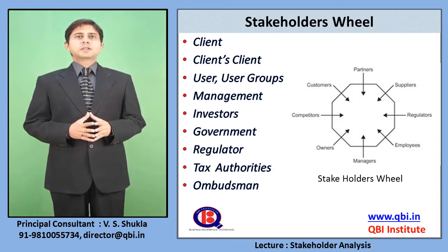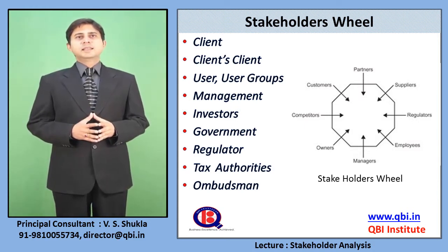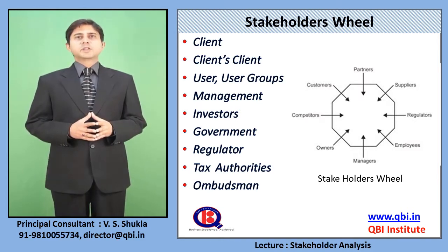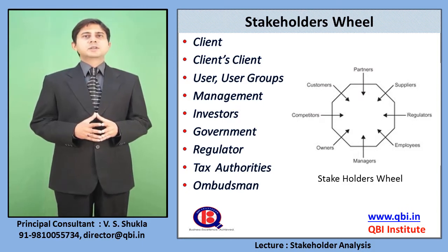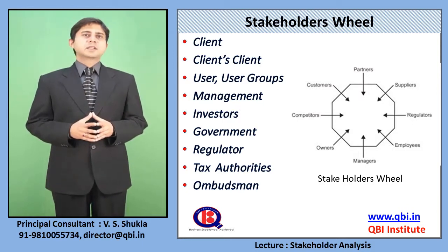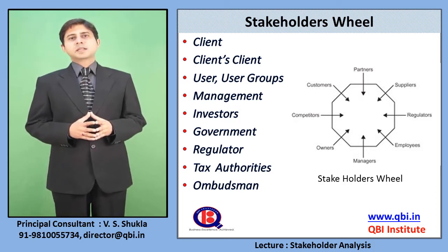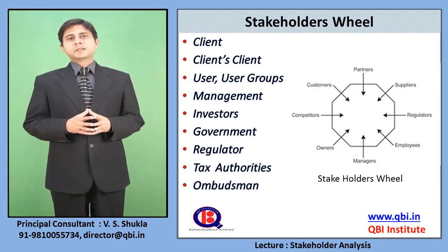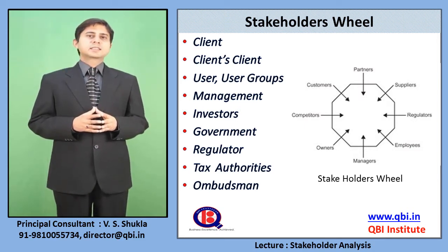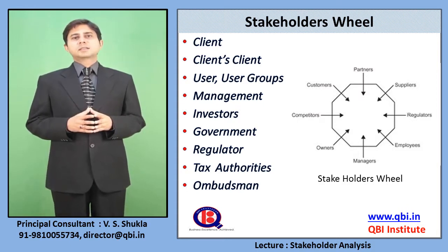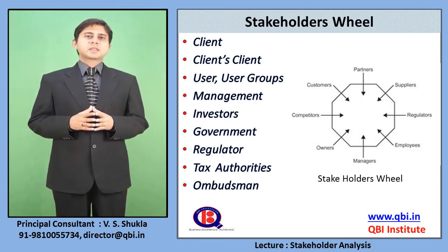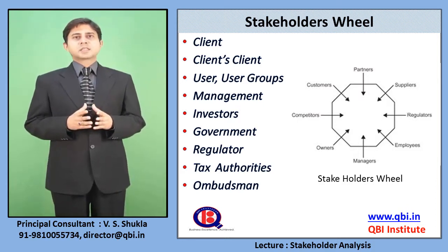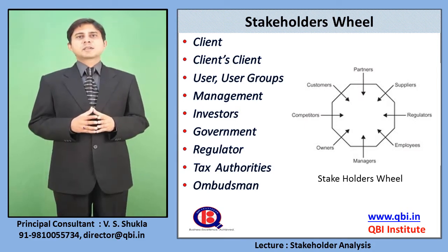Now let us learn about the stakeholder wheel. Stakeholder wheel is yet another technique or visual through which you can identify your stakeholders. So if you see the stakeholders field, we have customers as stakeholders, our partners as stakeholders. So say for example, let us say you are delivering an IT solution. Included in this IT solution is a functionality of sending short messages, or SMS as we call them. And we are taking this SMS service from a third party vendor. So this third party vendor, who is our partner, is also a stakeholder.